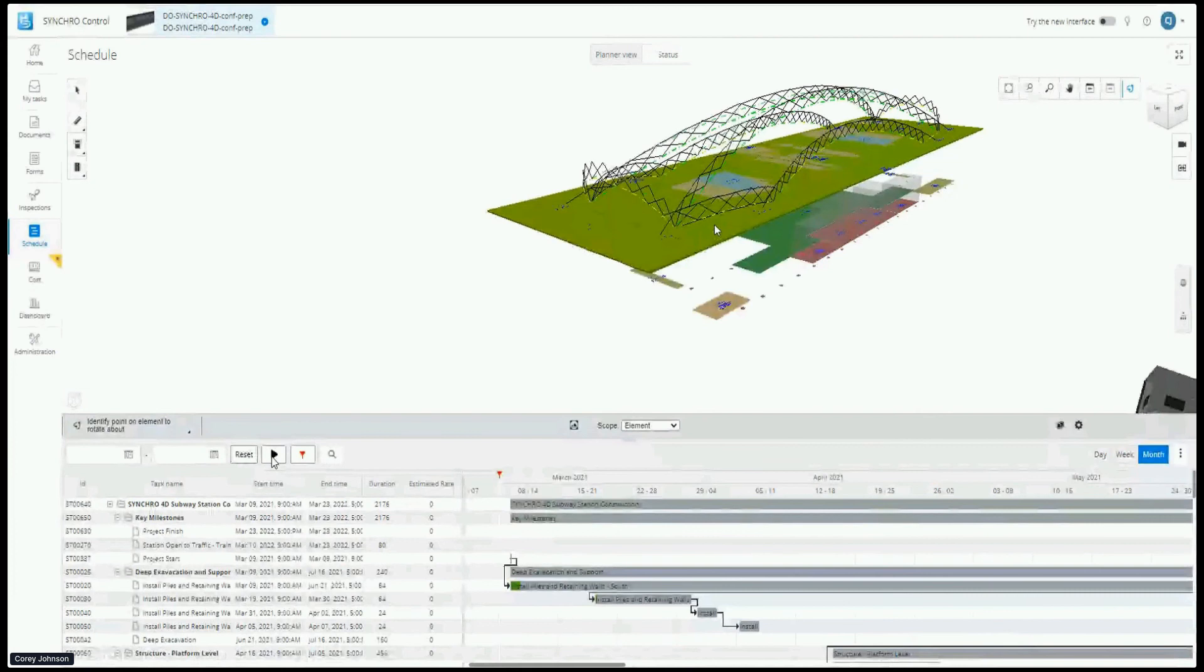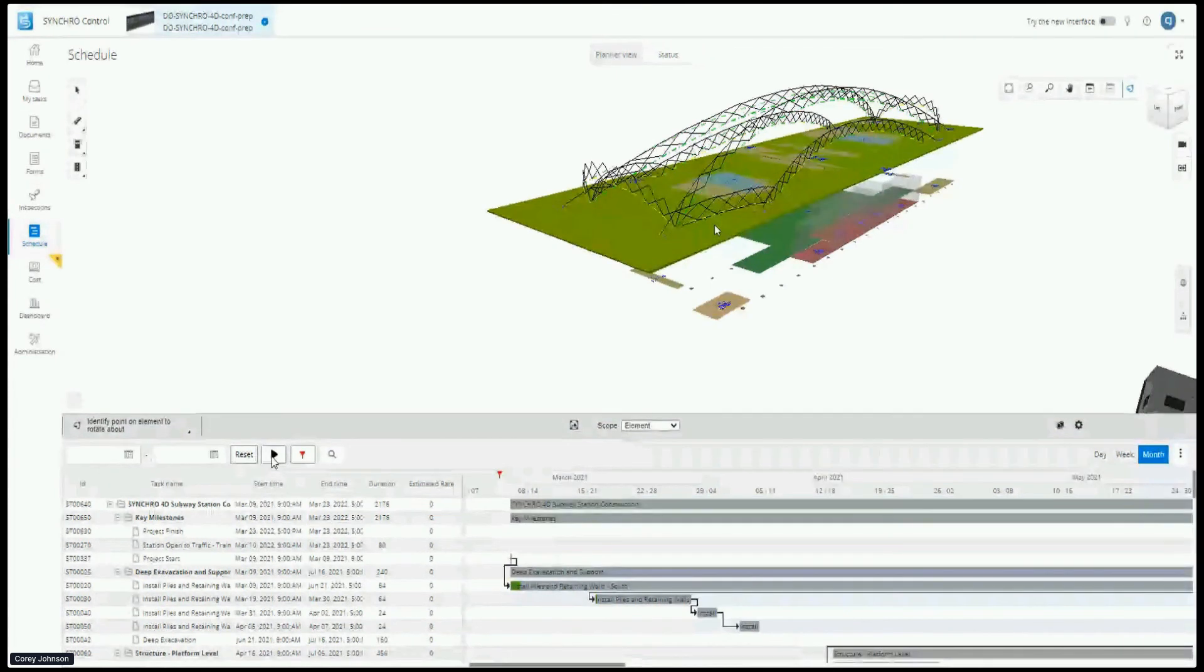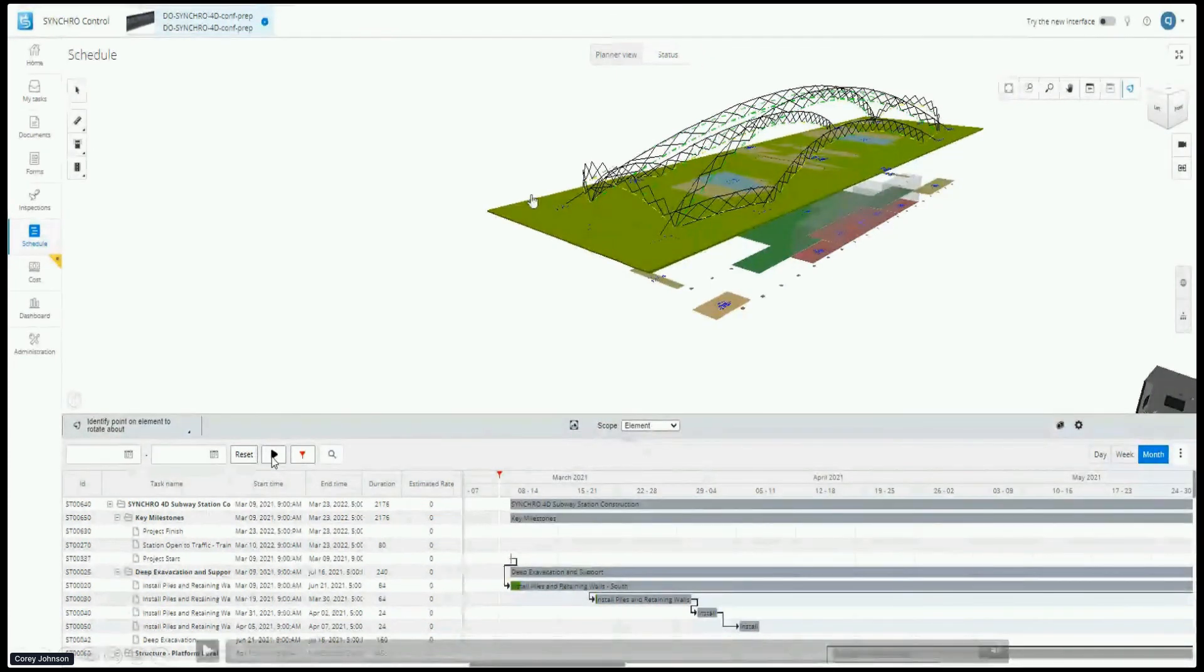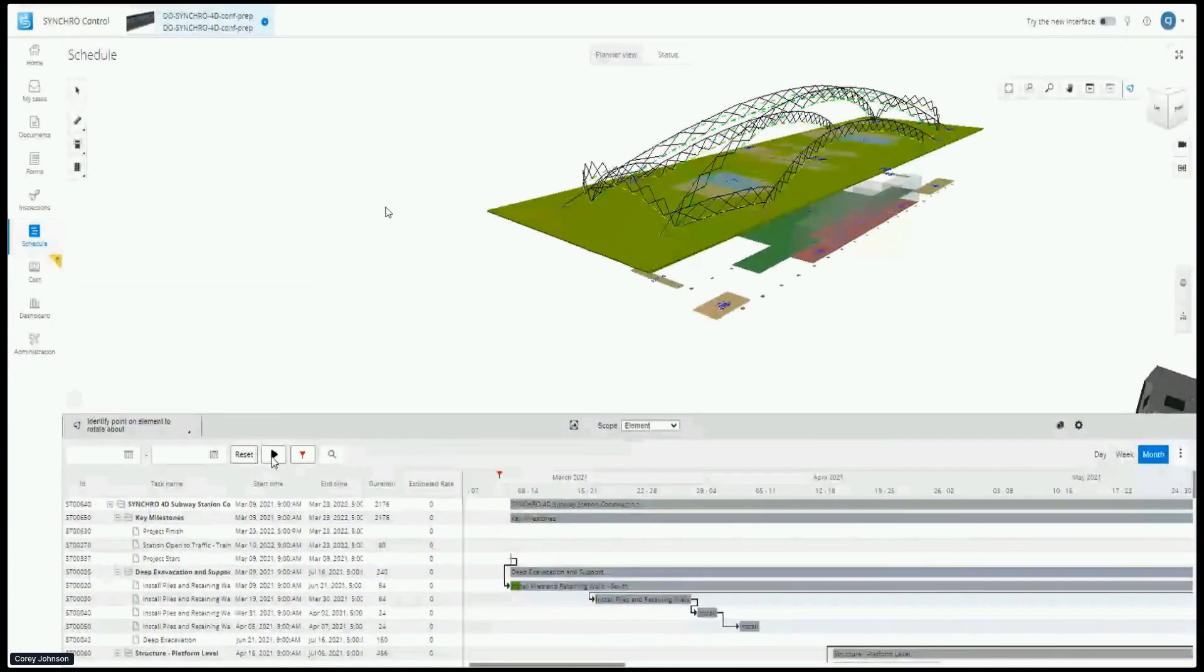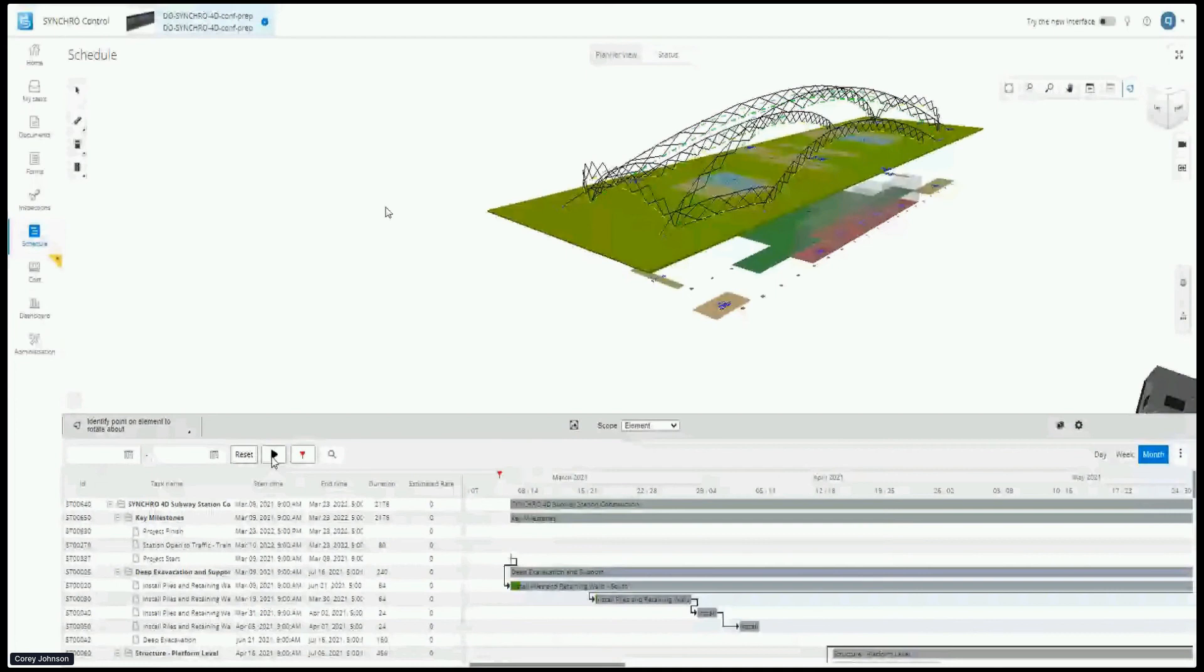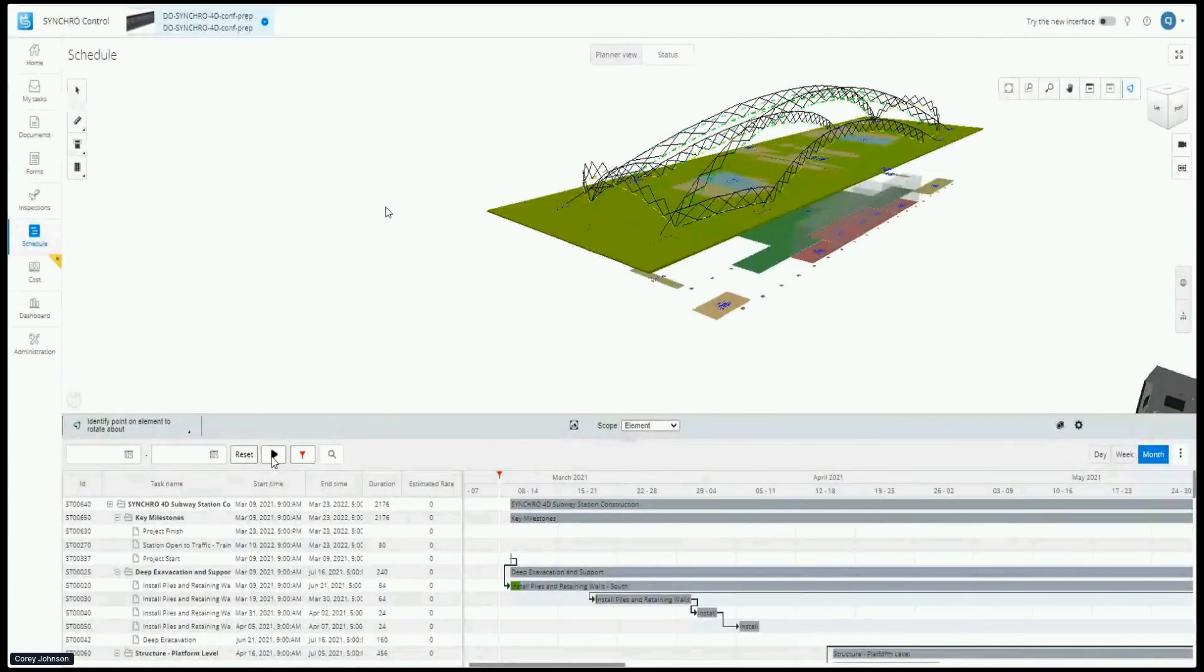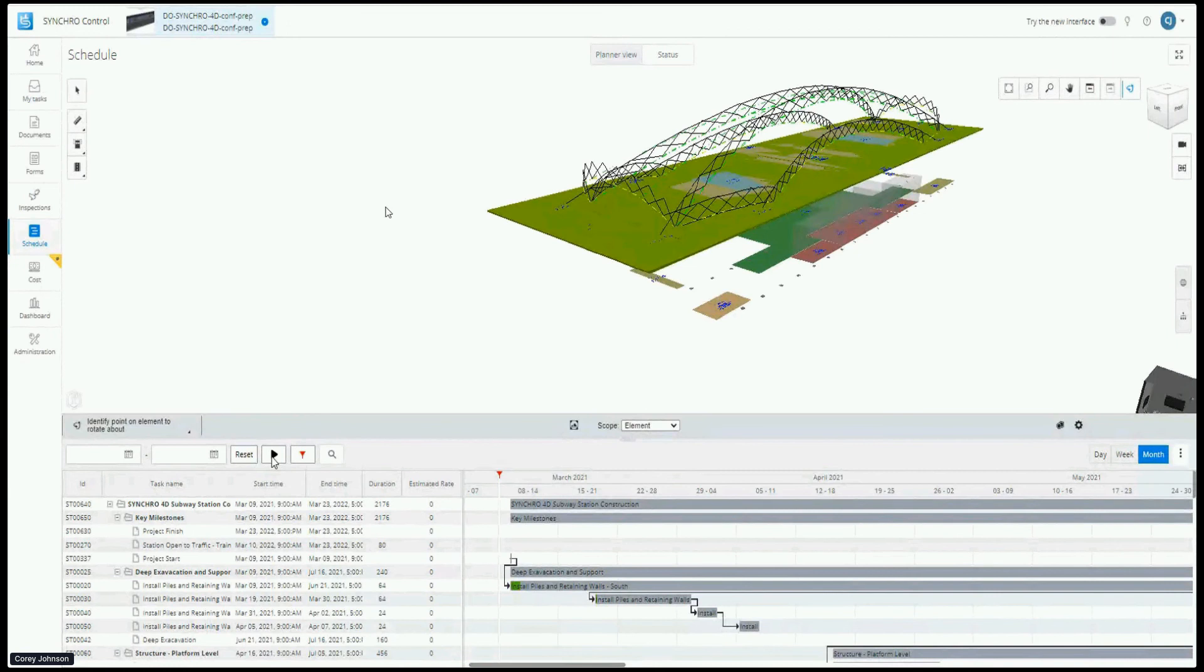But we can also change the color of the model based on percentage complete. You have a lot of different options - one of the powerful features of Synchro. And then you can even do on our desktop app - because that feeds a lot of this - we don't have it on the web-based app, but on the desktop app you can actually do a planned versus actual, and you can see the simulations going in parallel and see where I should be versus where I actually am. The volume or area? Yes, yes, we can handle those.